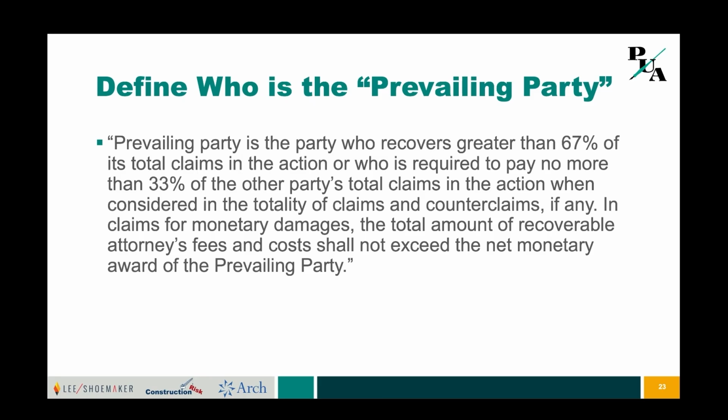I've had situations where there was no definition in the contract and I had to settle a case because it was an $8 million claim. I felt comfortable I could litigate it and defend all but about $300,000. But the other firm had 3 very expensive attorneys on their side, and I'm the only attorney on my side being paid by the carrier. And if I lost $300,000, my client would have had to pay, who knows, maybe $1 million in attorney's fees. But there was no insurance that would have covered that $1 million. So it forced us to settle that case where I could have done better if it had gone to litigation. And I've had other cases similar to that.